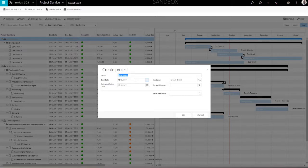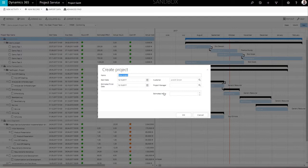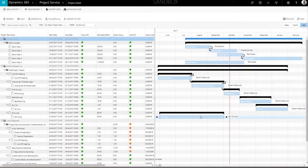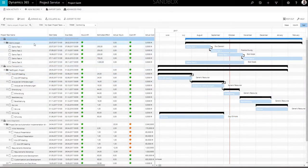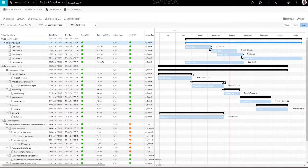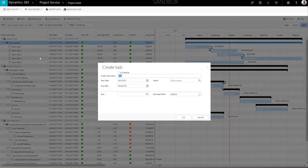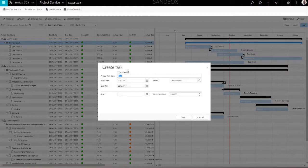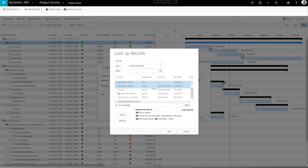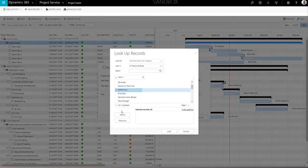To add a project task to an existing project, simply select the project, open the context menu with a right-click, and select the Add Child Task option. You will see a pop-up form with pre-filled project information, which may be edited. Click OK to confirm.